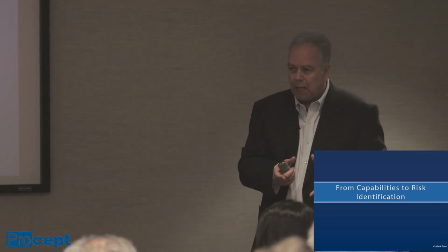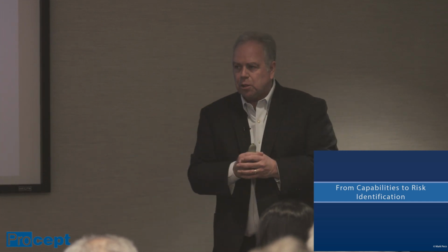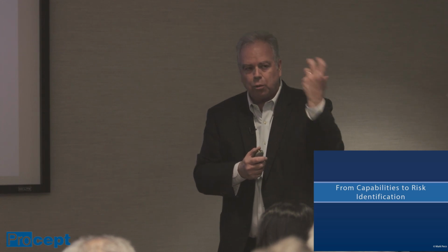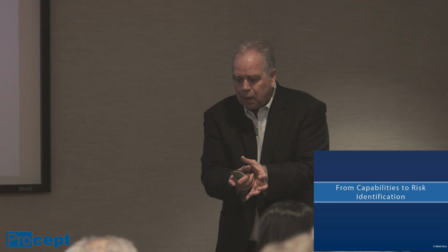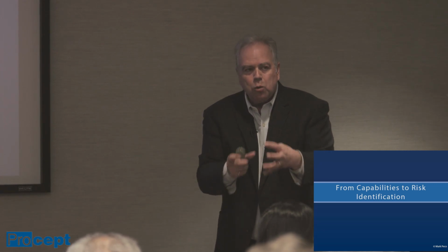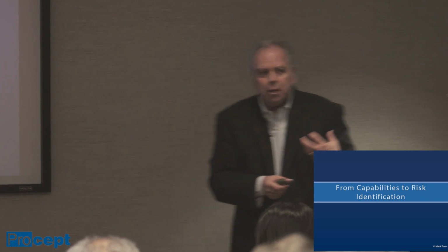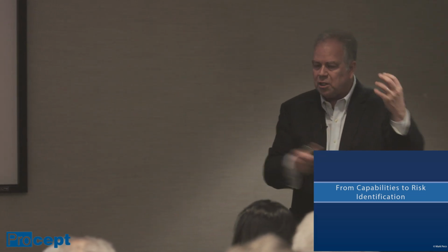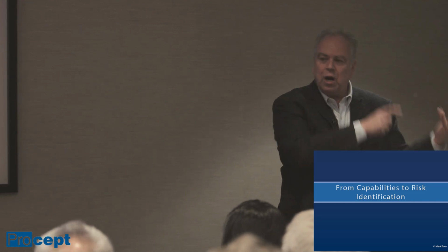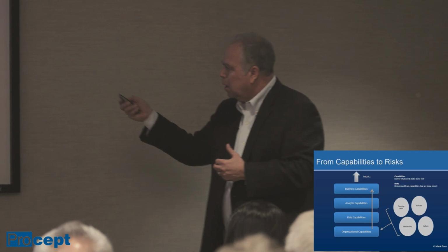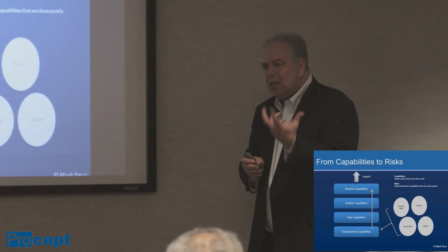And that's the emergent property happening. If these 4 things are there, collectively the capability emerges. And that's what we have to think of between a program and a project. So there's different kinds of risks. At the project level, there's the risk of those components not fulfilling their design or their requirements. But there's another sort of risk at the program level, which is that they don't fit together. They don't create that emergent property, which is the capability I truly want. So I want to find out how to identify these risks so I can mitigate them and take action on them.